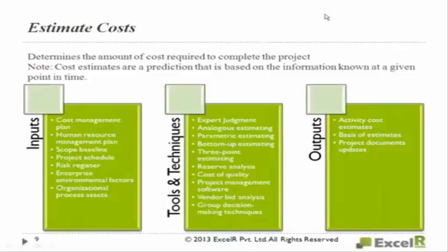He wanted to know the accuracy. Is it perfect, or what is your confidence? You may say plus or minus 5% variation is possible. Plus or minus 10% variation. Plus or minus 15% variation. So that will indicate your confidence levels also. And what is the precision levels you are talking about, the accuracy levels you are talking about.